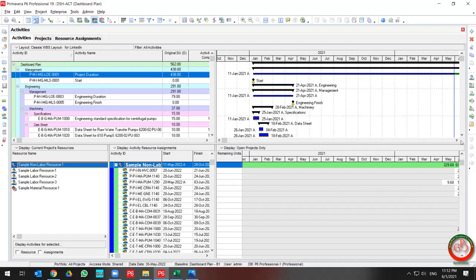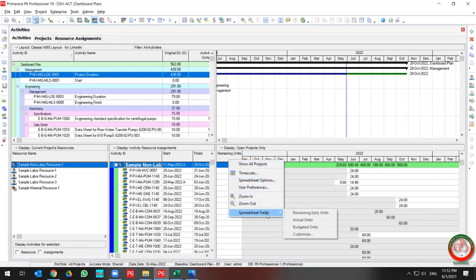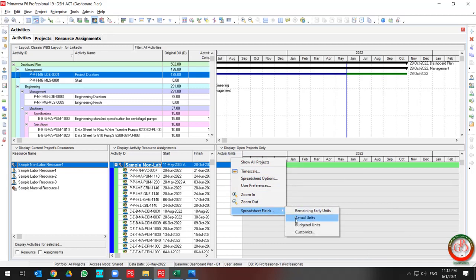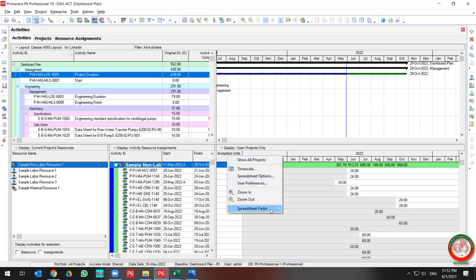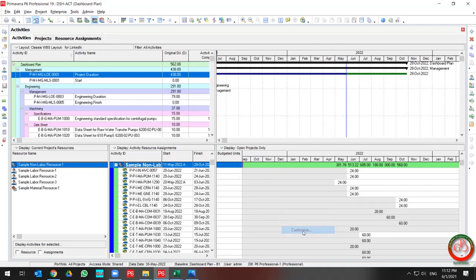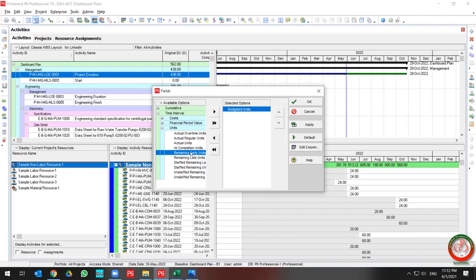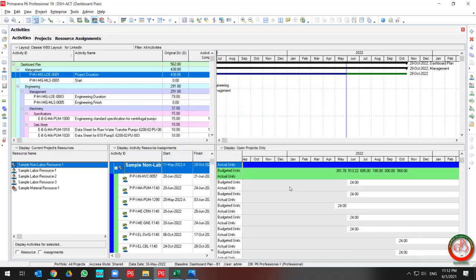you can show the distribution based on Remaining Unit, Actual Unit, or Budgeted Unit, and do comparisons based on your requirements through customization for each field. As you can see, I added Budgeted and Actual Unit for comparison purposes.